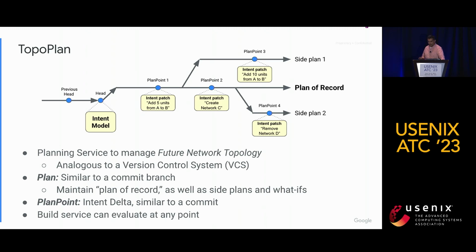This is invaluable because, 1, it allows us to create network designs for the future, enabling most of the pre-deployment preparation steps, like fiber length computations and material orders, to take place. And 2, it allows us to detect potential issues weeks or months prior to actual deployment. For example, double allocating a port for 2 different augments, or an invalid execution sequence, and so on.